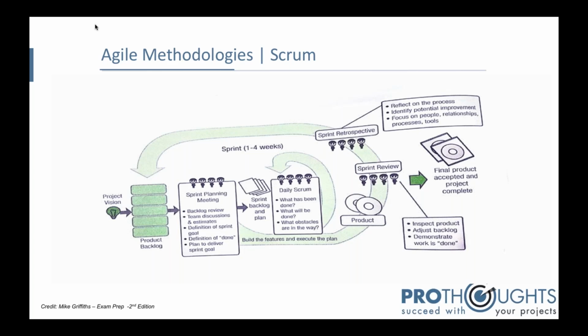Of course, the product owner, who handles the product backlog, says which feature is the most important. He does consult the team as well, but the product owner, along with the customers, as a representative of the customer, suggests which features are the most important. There are various methods to choose a feature and rank the priorities.